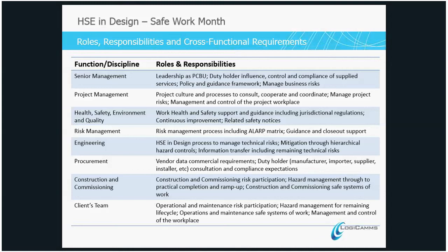Project management. So on a project now, obviously the size, whether it's a large project or small, doesn't matter. There's always a project management element to it, and in that, the project management needs to ensure that the culture is set up and the processes are there to consult, cooperate and coordinate. So who do we know that we need to talk to on the client side? Who's the expertise? Who's going to give us the information that we need to understand about what the risks are on their site, how they run their business, how they run their operations, and how we can then use that information to influence the design.